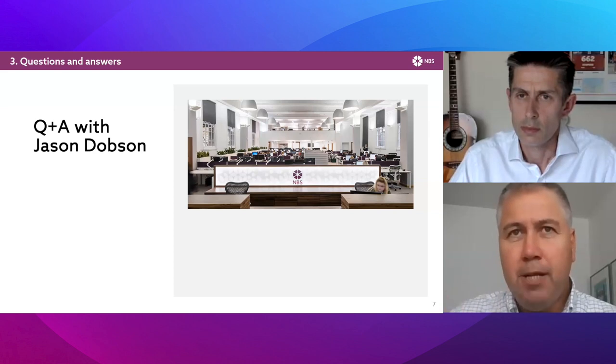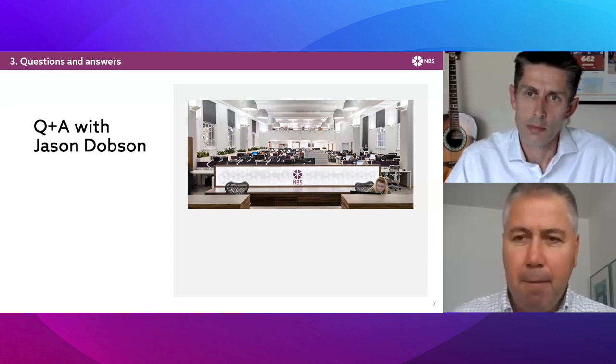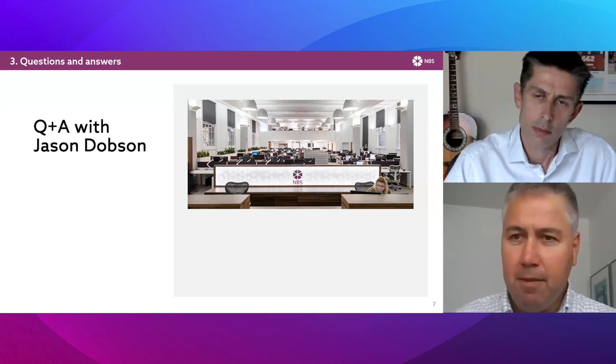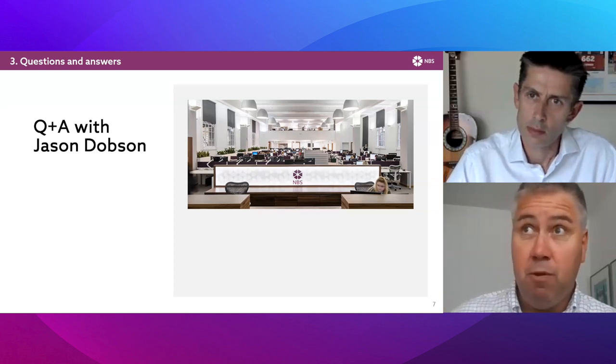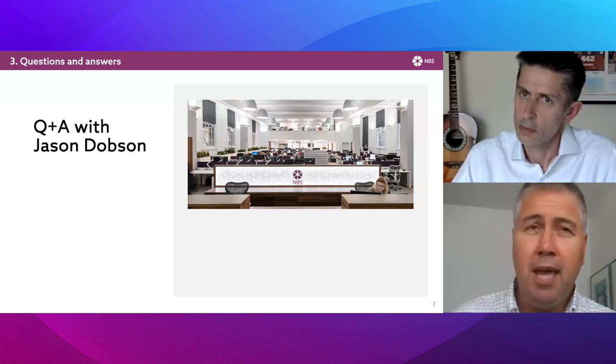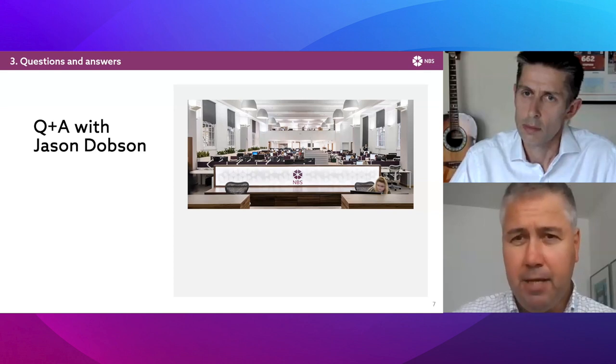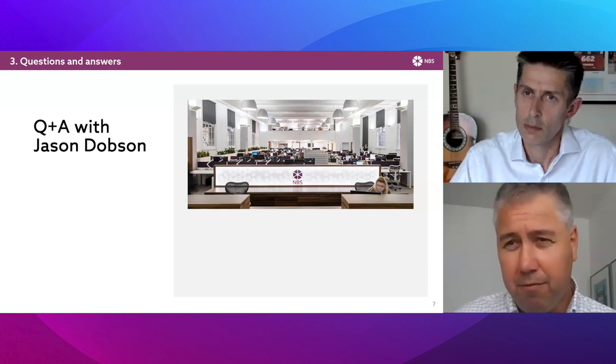Actually during the work, I know a lot of contractors have their own QA procedures and that's captured. But as designers, we should be capturing that in our specifications. Perhaps if we're dealing with contractors that maybe aren't as well developed in their QA procedures as some, we should set it out in our specifications, and we should stipulate exactly what we're expecting in terms of the installation, but also how to complete that job. How do we want them to test it? Who's going to witness it? When are they going to do it? What documentation do we expect? And who checks that documentation when we verify at the end?